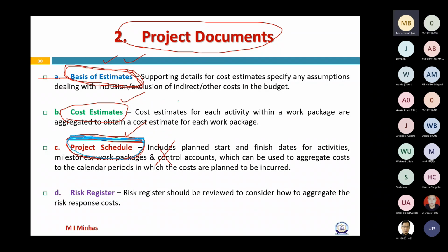So this would keep happening during the course of the project. This was my first baseline. For example, I told you that you have to submit your assignment in the 7th week. This is my first baseline. Because of some reason you said, no sir, please push it forward. I made it the eighth week, and because of that our quiz was moved to the 10th week, and everything kept moving forward. So initially the original course outline was your baseline, but we kept changing that baseline with the approval of, let's say, me or somebody else.